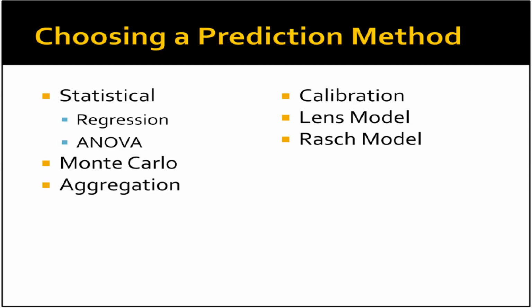As more tracking data is obtained, it can be added to the model, giving multiple updates to the predicted project's outcomes. If your data are not numerical in nature, but you are tracking things such as perceptions or opinions, you may want to use an aggregation model to help you predict final or sustained outcomes from project tracking data. This type of model can help you to limit the influence of extremes of results that can occur in these types of data.